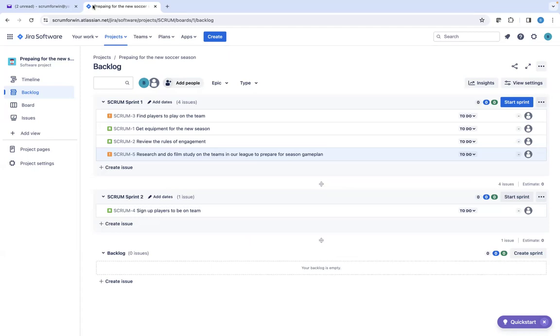So once we go through these things and we get a common understanding of what is expected from each story and we start to estimate them, then we might see, hey, this is too big. We need to break this item down. So there is still discussion for us to be had around that. But that was another good question.